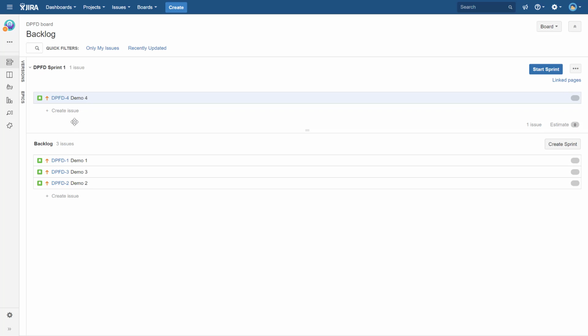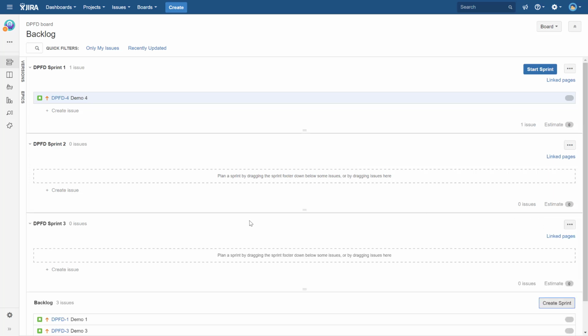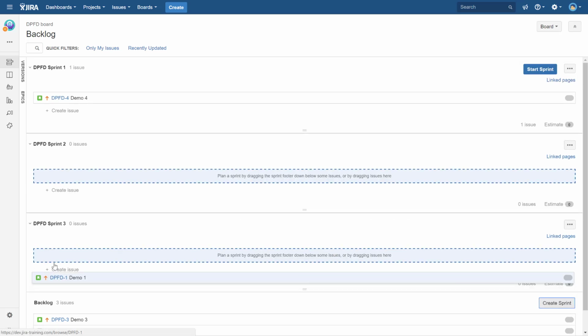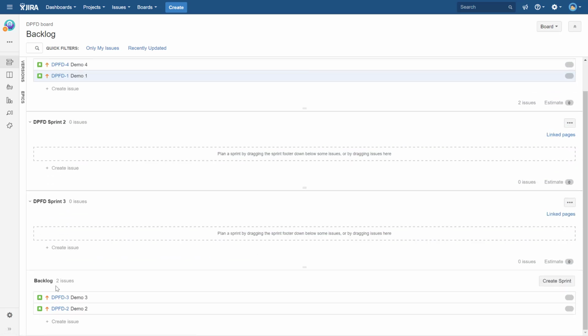Okay, and now I can also give you another tip, because for some reason people ask me, can I create multiple sprints? And the answer is yes, of course. It's agile, so you can create as many sprints as you want. There's no limit, but just be reasonable. Do not create like 20. It's going to be too many. And how can you plan them, especially if you're planning to have 10-day sprints? But 2 or 3 is a very, very good practice. And now, when we've got our 2 or 3, you can drag them. So basically, let's just drag and drop.